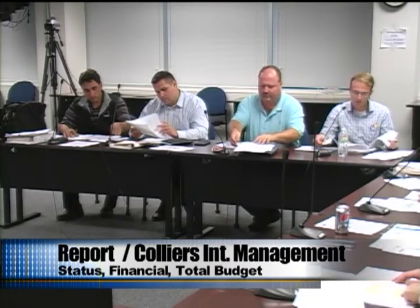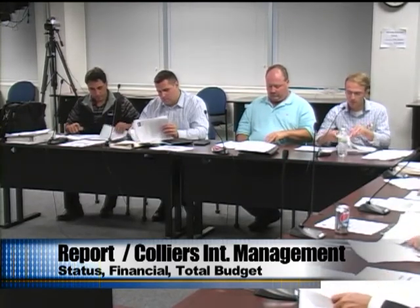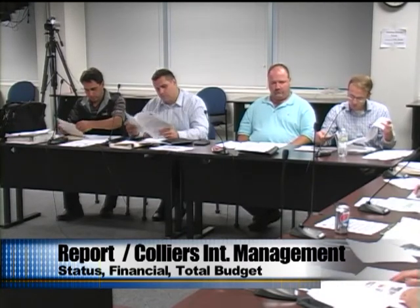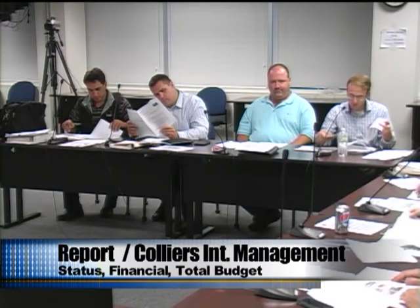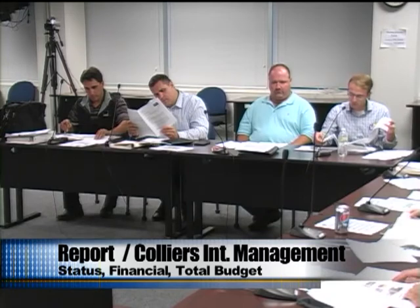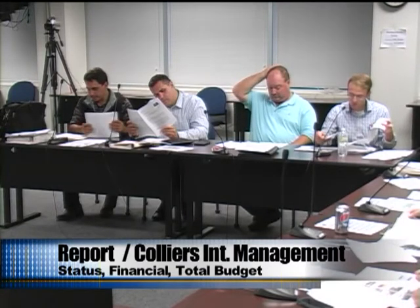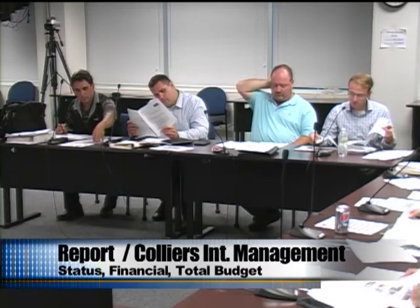Okay, so project schedule, Jeff went over that, but just because we say it every meeting, on the back of this attached packet here is the actual project schedule. We're not going to go through it, obviously, but it's there for you to take a look at visually to see what we're talking about. There's a little bit of resequencing that needs to take place at the locker room finishes, which they'll do, but there's a lot of open time beyond what they thought they would get it done, so we agree with Sean, but we don't anticipate any project delays, and we think that generally everything's on schedule here.